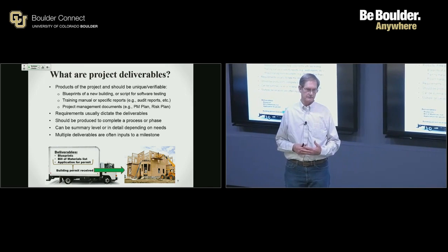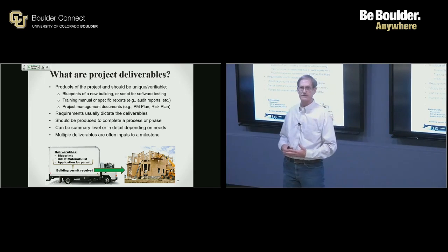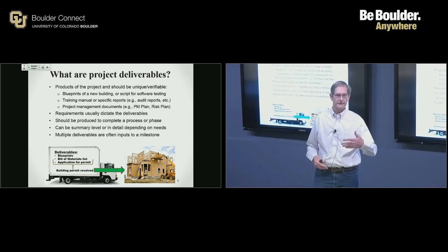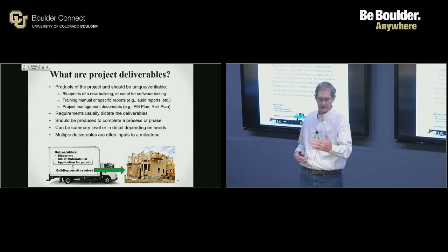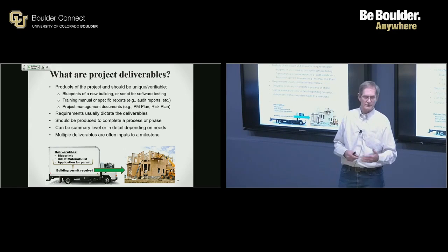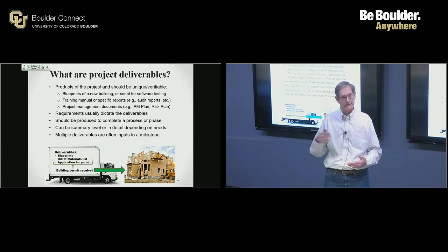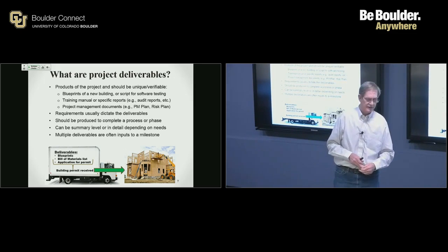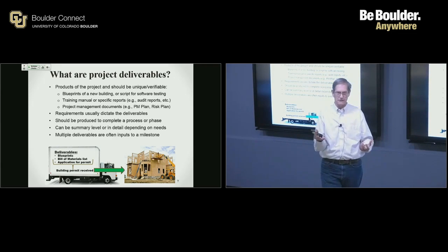They're just kind of benchmarks along the way that show that you're starting to reach the goal, the end goal, I suppose. Okay, benchmarks. A deliverable could be a document, like the budget could be a deliverable. I create the budget, I go to Lillian, she reviews and approves, boom, that becomes, you called it a benchmark, I would call it a milestone. Becomes a check mark and allows us to go on to the next phase. Okay? Keep in mind you've got project deliverables and product deliverables.